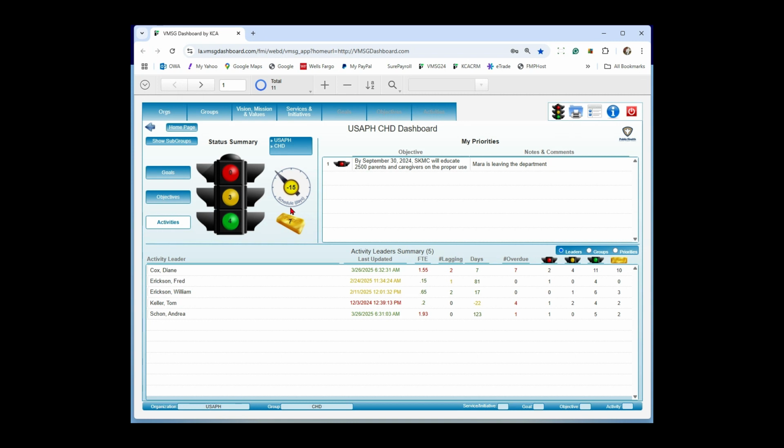So we're exactly halfway through the year, 50% of the way through the year. Let's say one of those activities is only at 40% complete. So if we're only at 40%, that means we're 10% behind where we should be based on the time of the year. 10% of 365 days would be about 36, 37 days. So it's a minus 37. And let's say another one of those activities is at 60% complete. So it's 36, 37 days ahead of schedule. The two of those will balance out to 0.